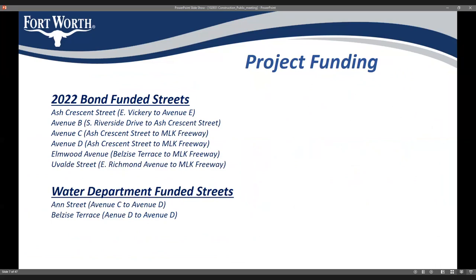This slide shows the funding for each street. This project is part of the 2022 bond, which was voted on and passed back in May by the residents of Fort Worth. Six of the streets are funded by the bond, and a couple of streets are funded by the water department.